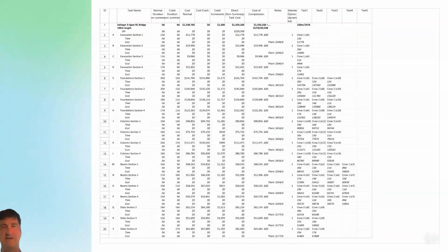So essentially, you have all the activities, you have a time and a cost, starts as normal, but what if we want to consider all our options? How are we going to do it? We're going to use utility data. We're going to filter through all of these options we have, choose the least cost method to save another day, and that, of course, relates to the critical path,